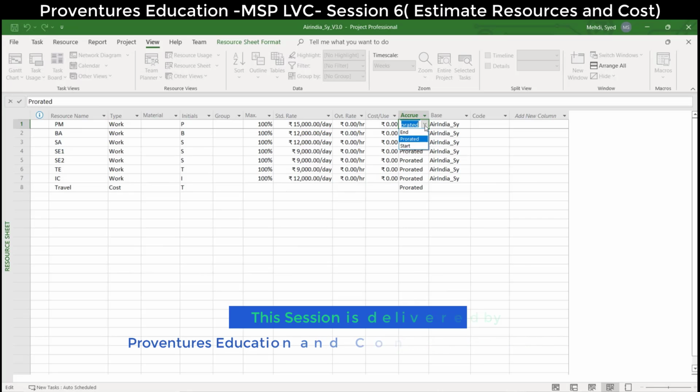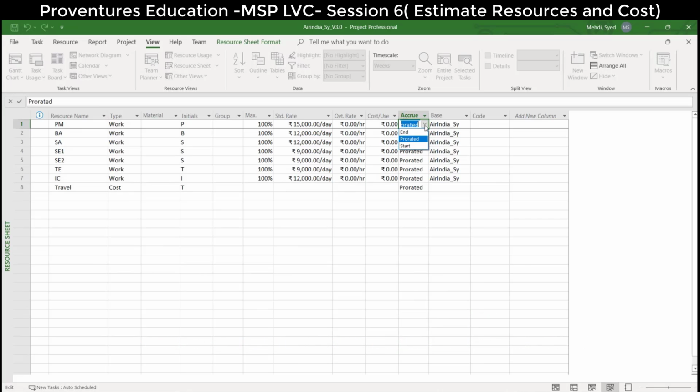But here, whether we pay or not, if a consultant works for one month at 1 lakh and has completed 10 days, he would have earned at least 30%, so he has provided 30,000 of services.